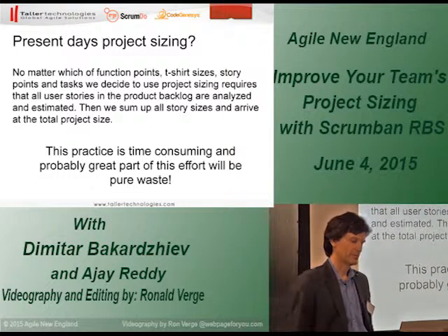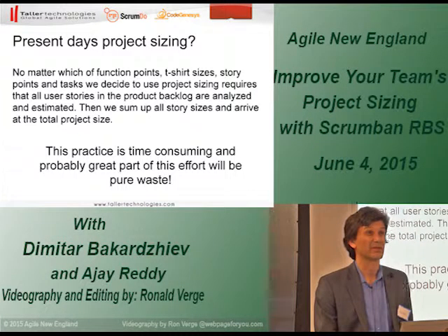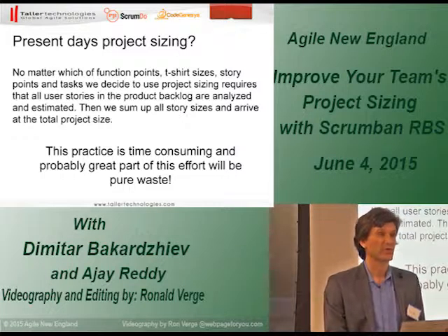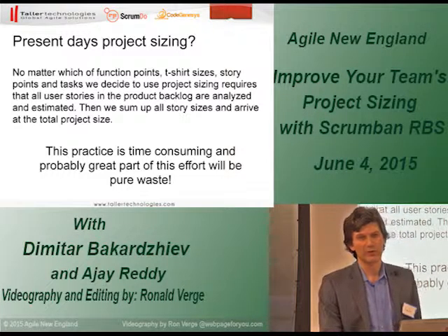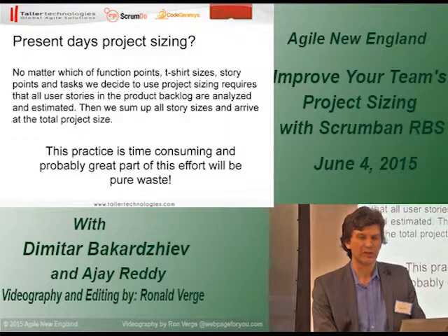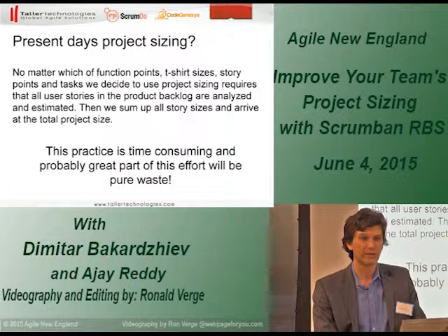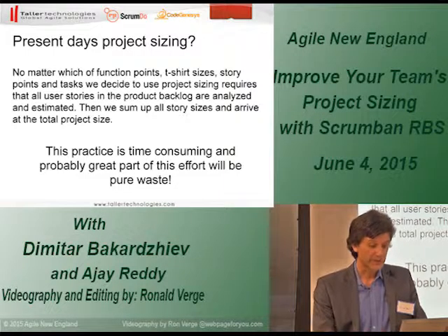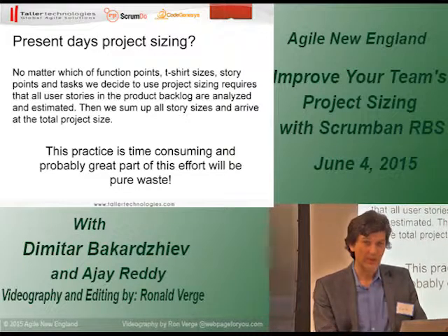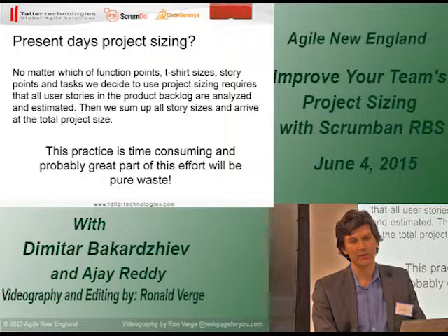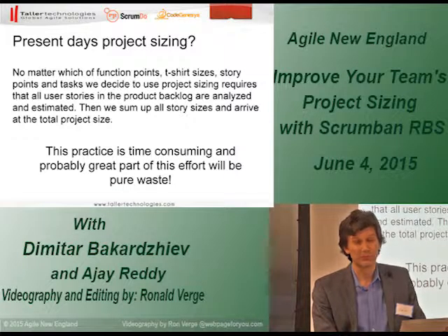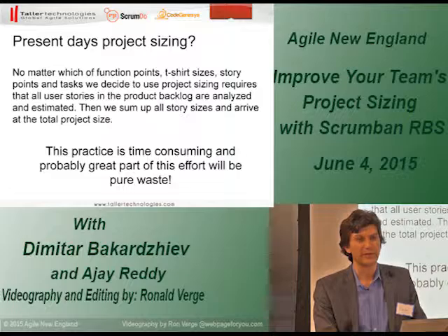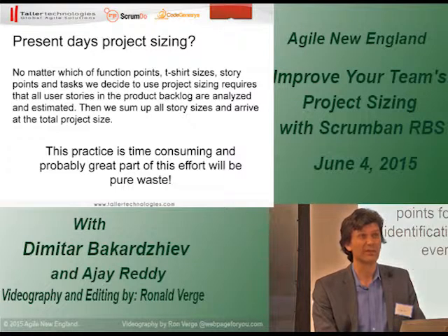So in the present day, no matter what unit of measure we use, function points, t-shirt sizes, story points, the way we size a project is to establish and analyze all the stories in a project, and then we sum them up and arrive at the total size of the project. This practice is time-consuming, and probably a great part of it will be pure waste because the requirements change. Some of the requirements will be dropped, new requirements will pop up, and if we try to analyze all of the stories, it's pure waste.